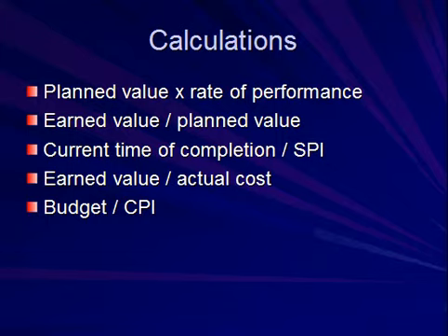To find the actual cost of the project per week, one calculates the cost performance index. To find this, divide the earned value by the actual cost. For instance, the CPI for week 2 equals 0.7. To find the actual cost of the project at its end, one takes the budget at completion, or $100,000, and divides it by the CPI. This number was $143,210. The values for the intermediate weeks were determined by estimating them as constantly increasing each week.